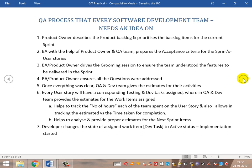The work items are then assigned to the corresponding dev and QA guys. With the help of the product owner and QA team, the BA prepares acceptance criteria for the user stories. Then the product owner drives the grooming session to ensure the team understood the features to be delivered in the current sprint. Any questions from developers are addressed by the product owner, and use cases corresponding to the user stories are described by the BA.